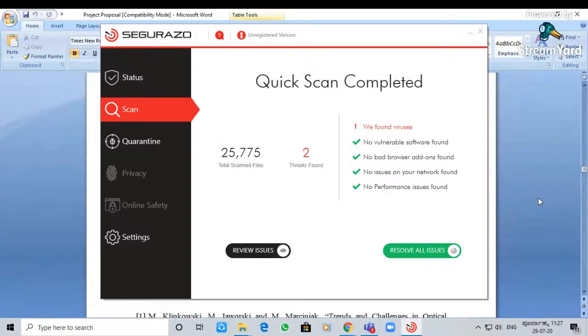Then we had the overheads, and we considered 20%. So this overhead is basically what I explained previously: if we apply for software through a vendor, the quotation is valid, let's say, for 3 months, but the project evaluation takes about 6 months or so. So the quotation will not be valid, or there will be an increase in the cost of the software or the hardware. So in that case, this overhead of 20% will take care of that additional cost gap.